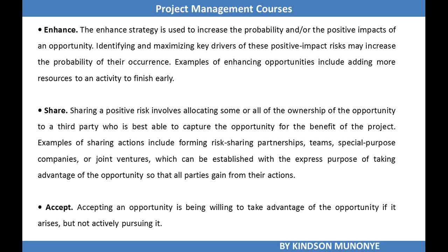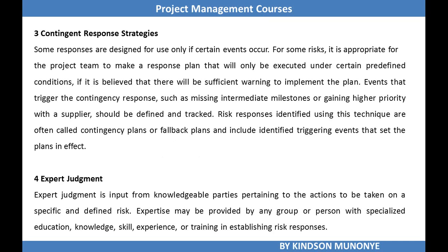What of share? Maybe going into partnership or a joint venture with another company, so that you make sure the opportunity is realized and the benefits can be shared. Then we also have accept, being willing to take advantage of the opportunity if it arises, but not actively pursuing it.